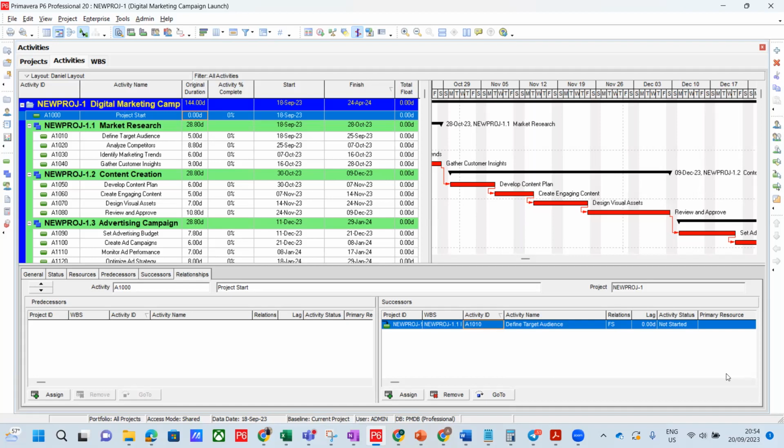And the third one is material, which is also called consumables. Once it's consumed, you cannot reuse it. So the first 2, labor and non-labor, are reusable.